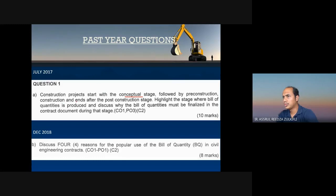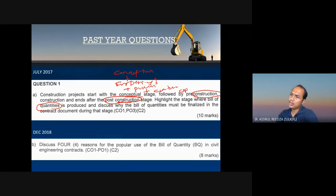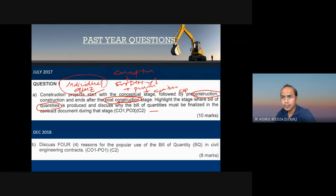The construction project life cycle starts with the conceptual stage, followed by pre-construction — which includes engineering and design, and procurement — and ends after the post-construction stage, which includes the operation stage. The second question asks you to highlight the stage where the bill of quantity is produced and discuss it. Submit as your individual quiz. Individual quiz is 10% total — I will give several quizzes. Submit through Google Classroom.